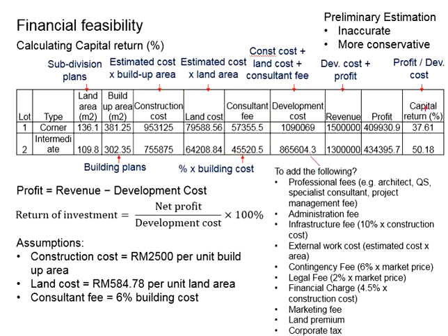Now that you have acquired the development cost, your next step will be for you to set your selling price. The selling price will be your revenue, which is the summations of the development cost plus the profit.